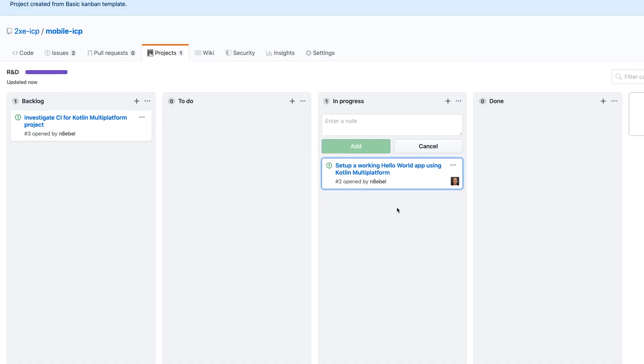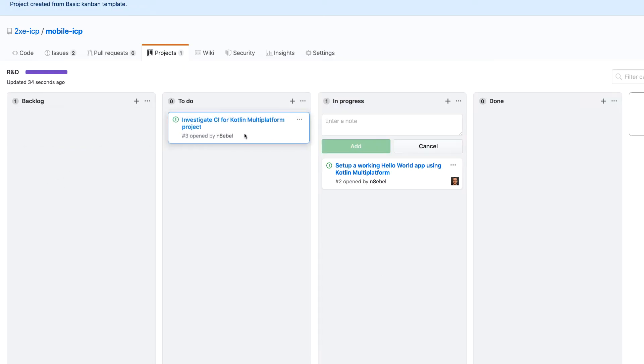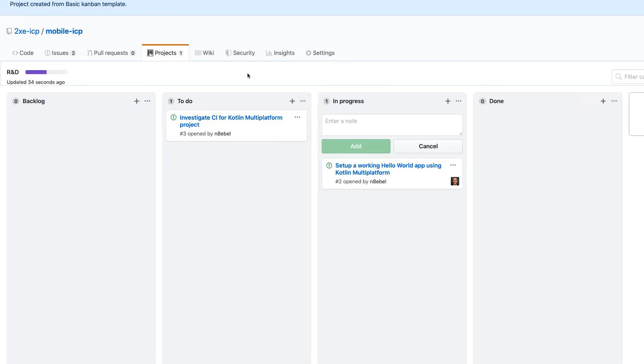So I'll move that to in progress and then for this current milestone, I want to move this investigate CI into the to do column because it's kind of the next thing on my to do list. So now I've got both of those tracked and I can see what the status of these issues is very quickly.